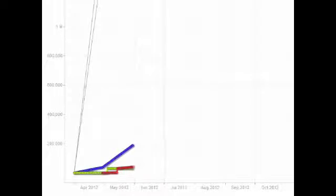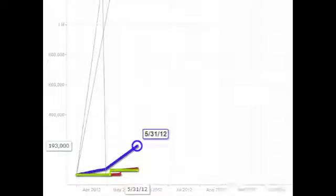Where the red line is above the green line, the contractor has to use his own funds to cover expenses.